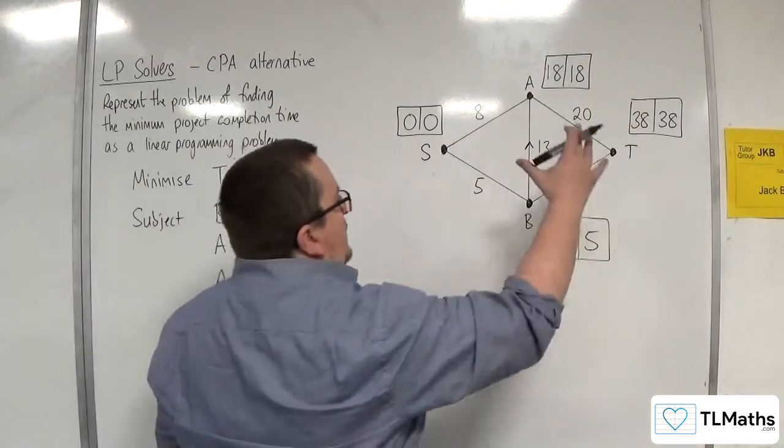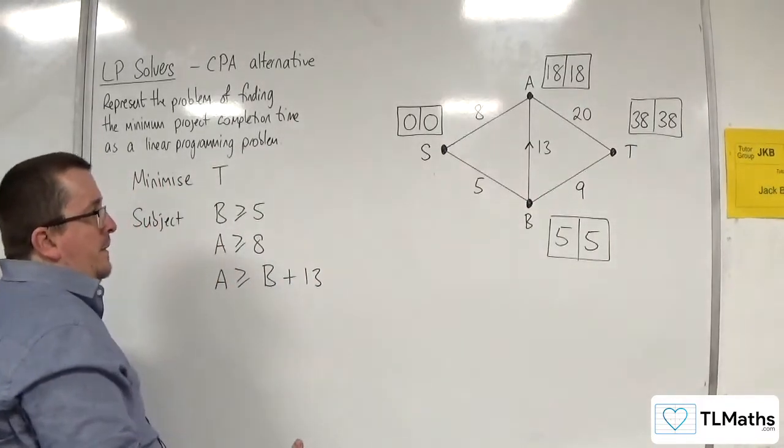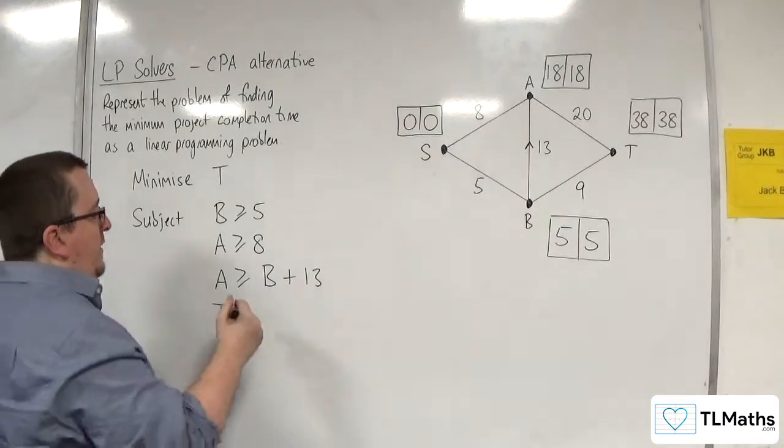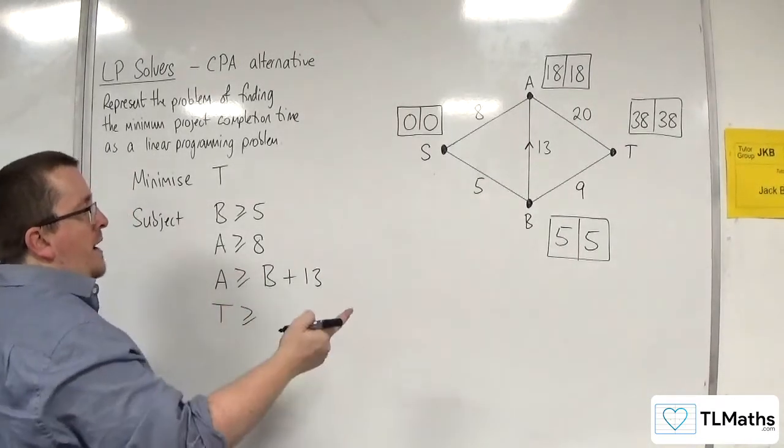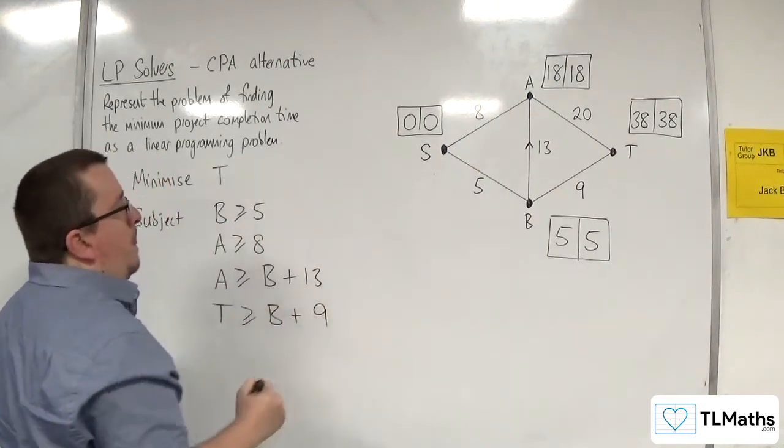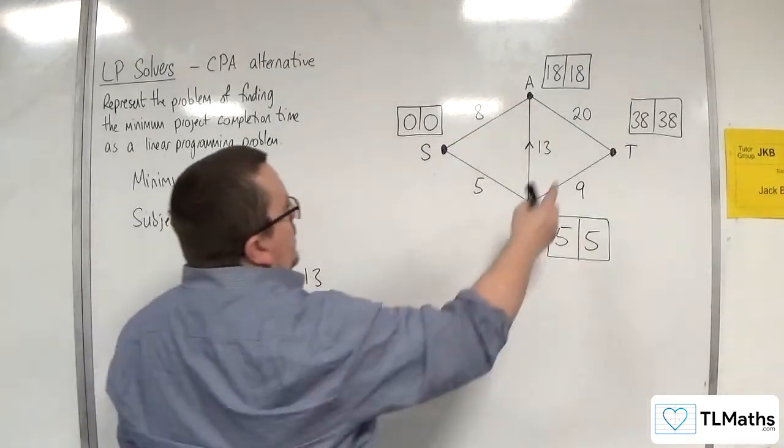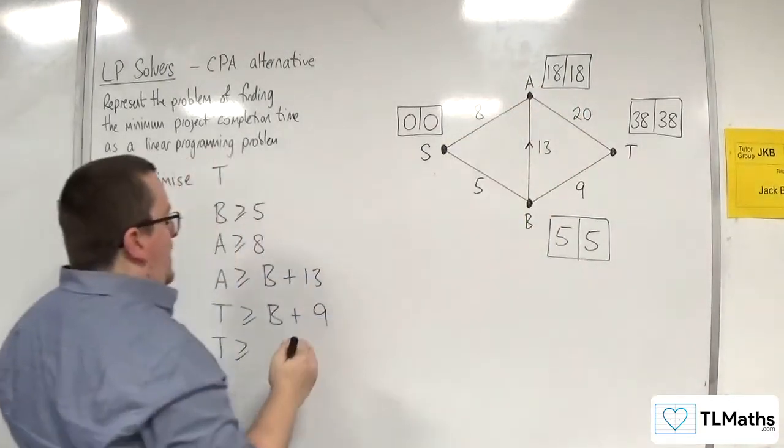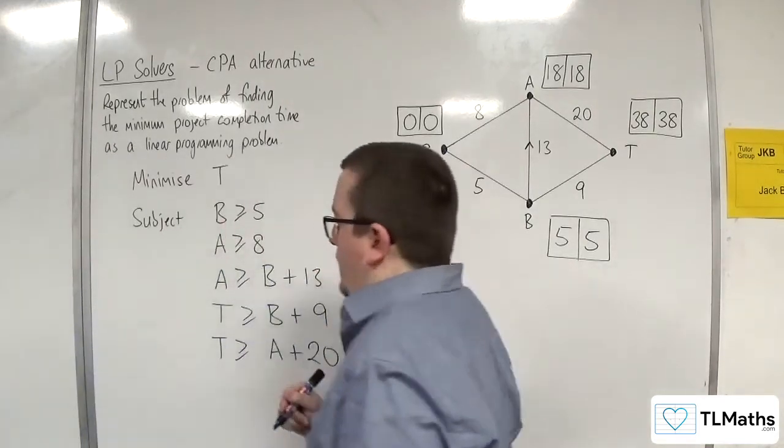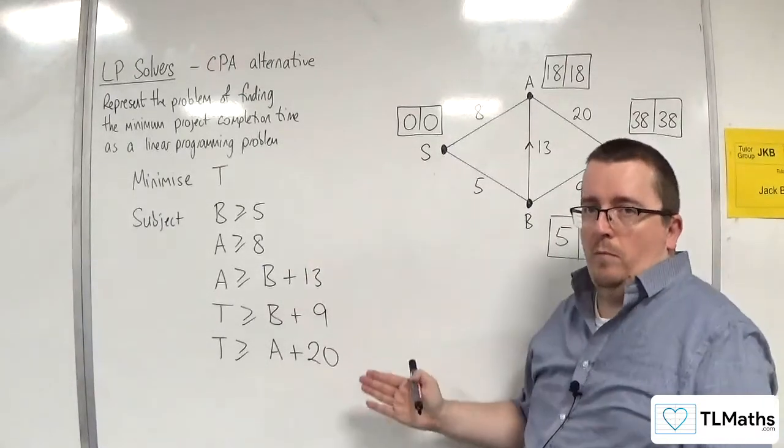Then for T, B, T we know is 9. So I can write down that T has got to be greater than or equal to 9 plus whatever value is at B. And T has also got to be greater than or equal to 20 plus whatever value is at A. And so that is my linear programming problem.